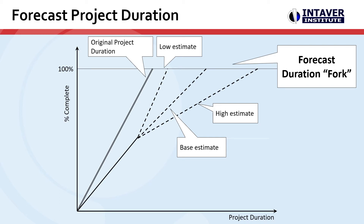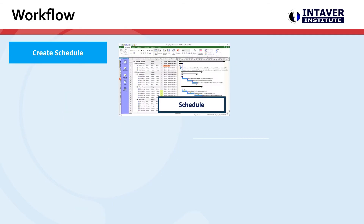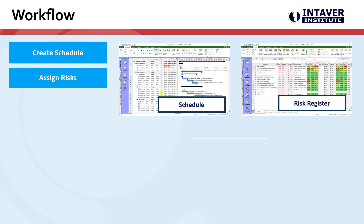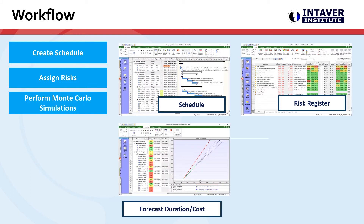Let's quickly look at the workflow. We're going to create a schedule, assign risks to the project schedule and costs, and perform Monte Carlo simulations. In the tracking view, we can see the original baseline and then the cone of uncertainty that shows us the low, base, and high estimates for the estimates at completion.